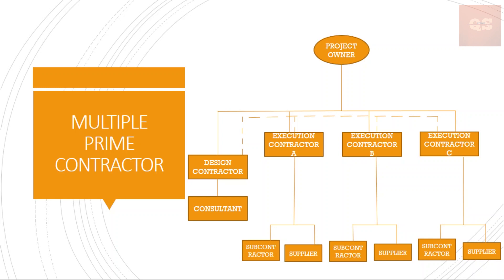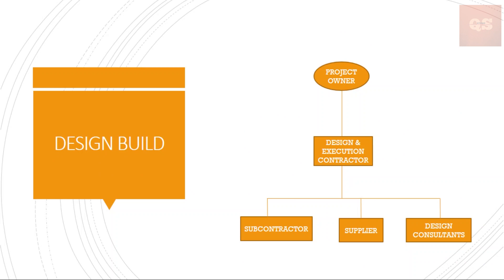The next arrangement is a Design-Build arrangement. The concept here is that both the design and execution parts are done by a single contractor, so there is a single point of responsibility for both design and project execution. The subcontractors, suppliers, and all design consultants come under this single contractor, who takes care of both the design and execution parts.